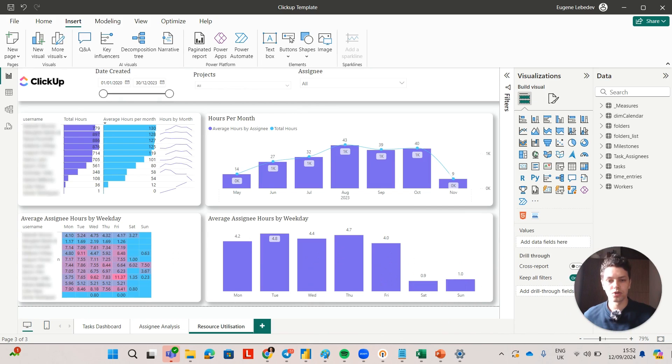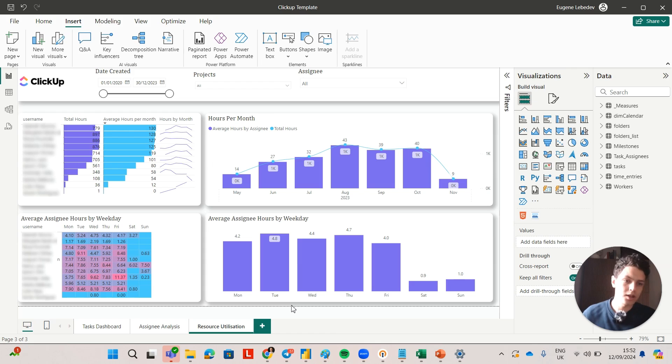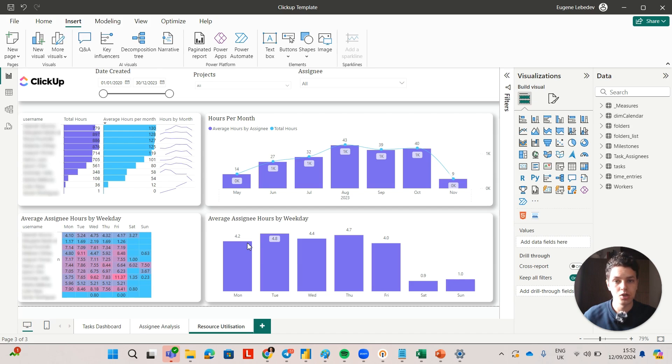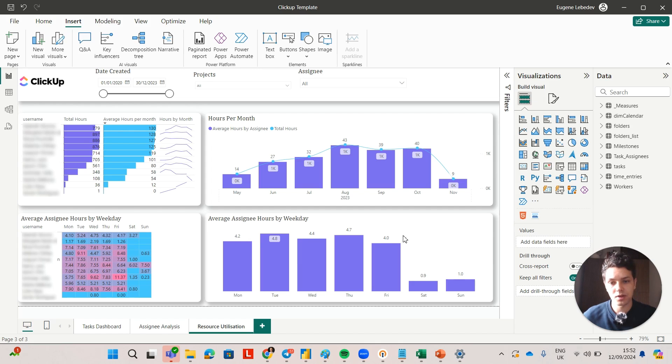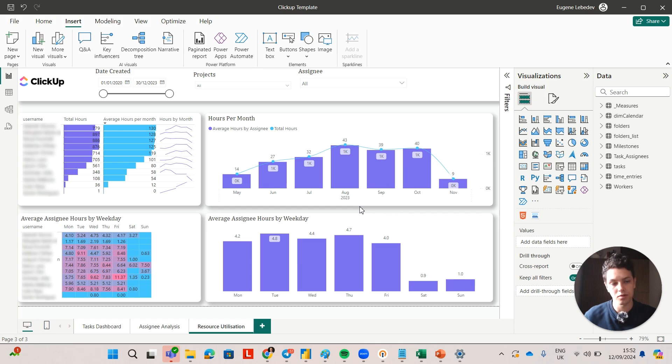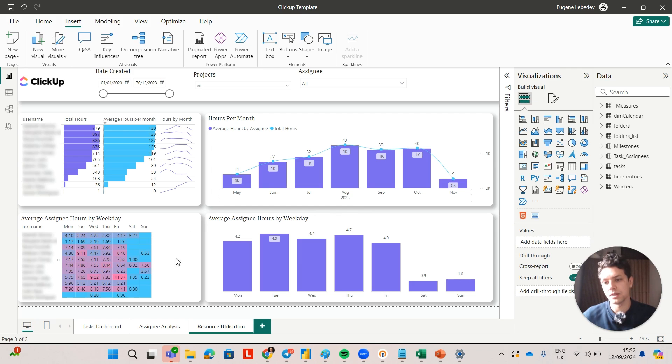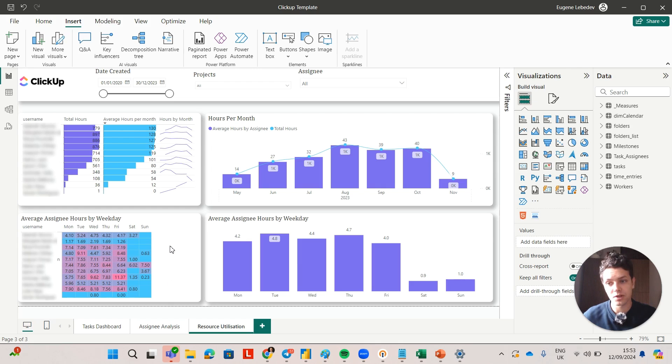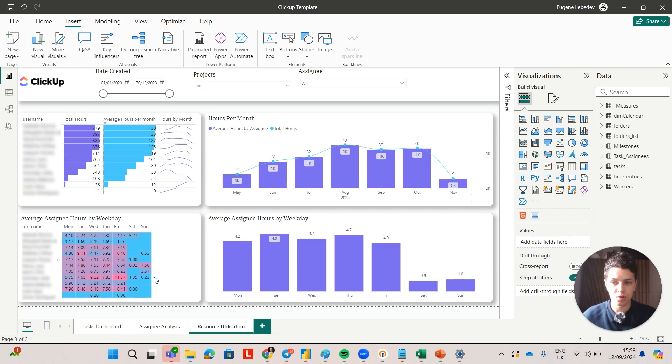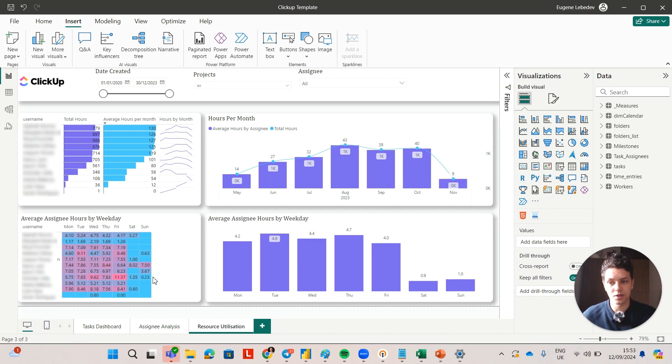Now the next page which I want to show is more for resource utilization and it can help you identify specific days or days of the week or specific months where you have more hours than before. This is useful because it would help you with your bandwidth planning throughout the week and also throughout the year. Another thing you can see here is that some people are working disproportionately more hours than other people. For example, the second line here, this person is only working one to two hours a day whereas we have someone in the team who is working nine or eleven hours a day. So obviously what you need to do is to redistribute some tasks or train somebody else on the tasks that this person is performing.